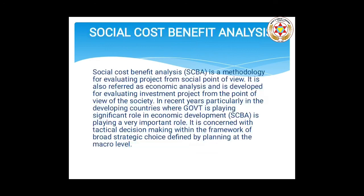Thus, we evaluate a project from the viewpoint of the society as a whole — that is called social cost benefit analysis. Social benefits include product services provided, payment for raw materials, payment for fixed assets, and employment opportunities. Social costs include opportunity cost, raw materials used, labor used, fixed assets purchased, and environmental damage. This is all about the social cost benefit analysis.